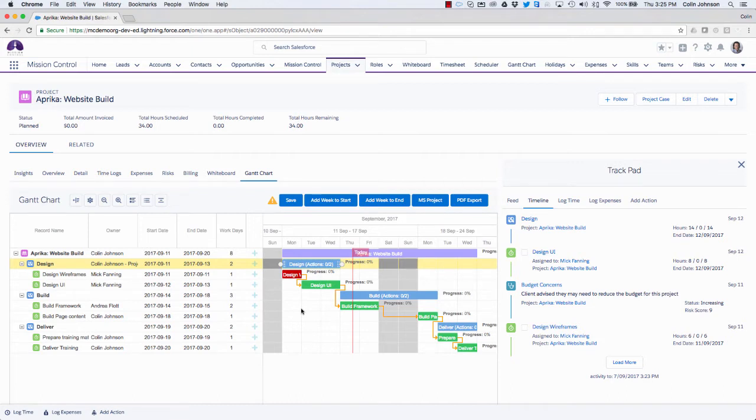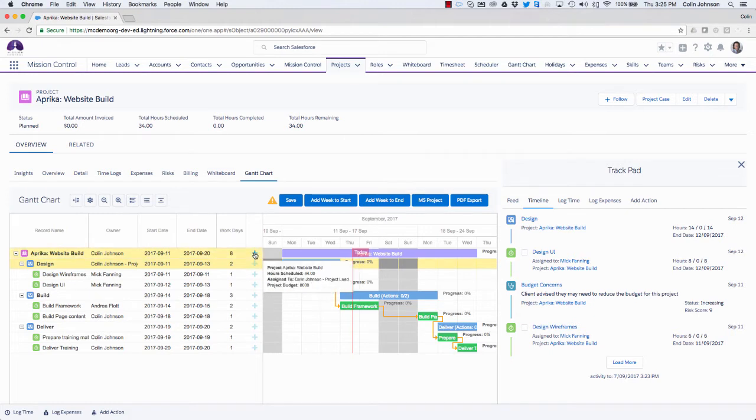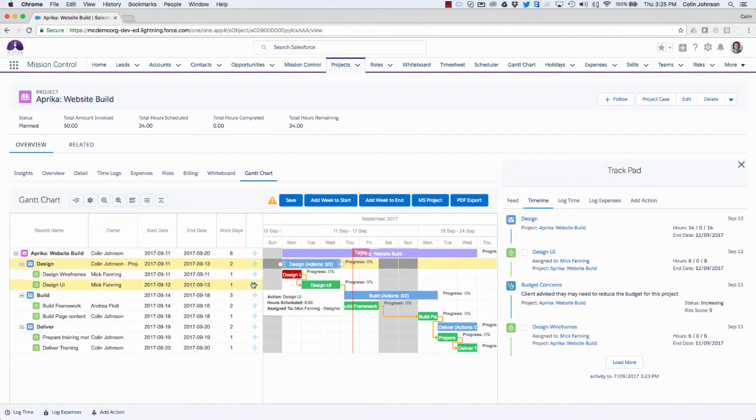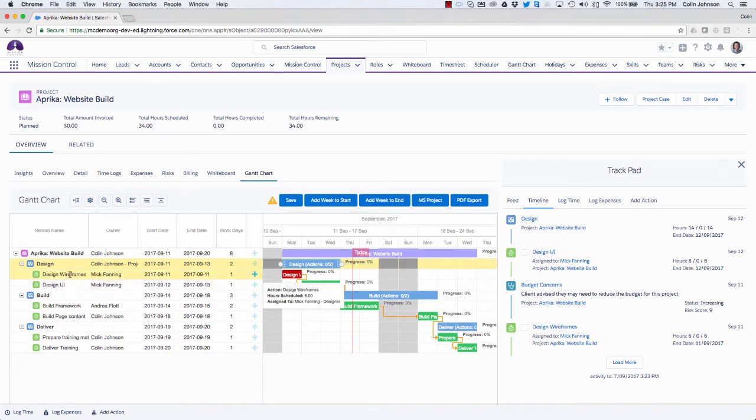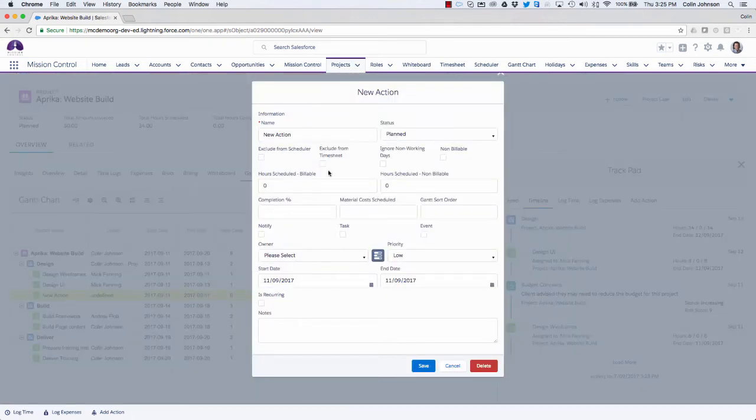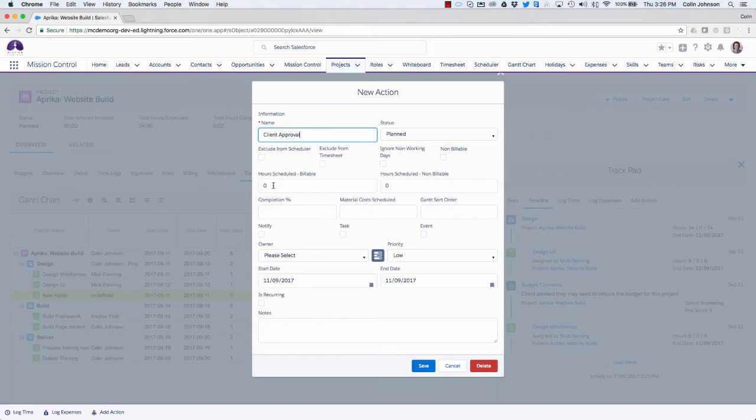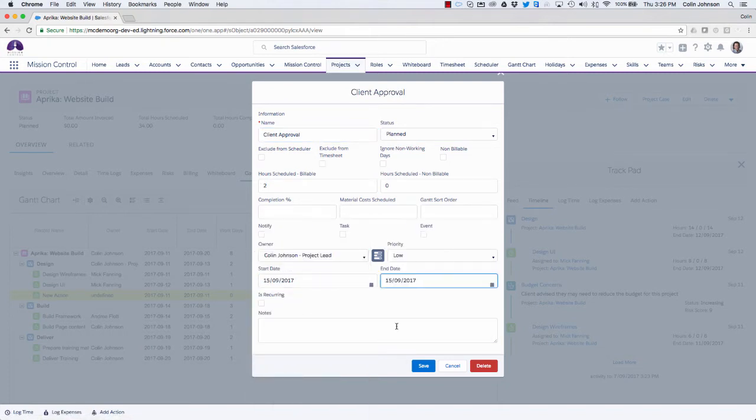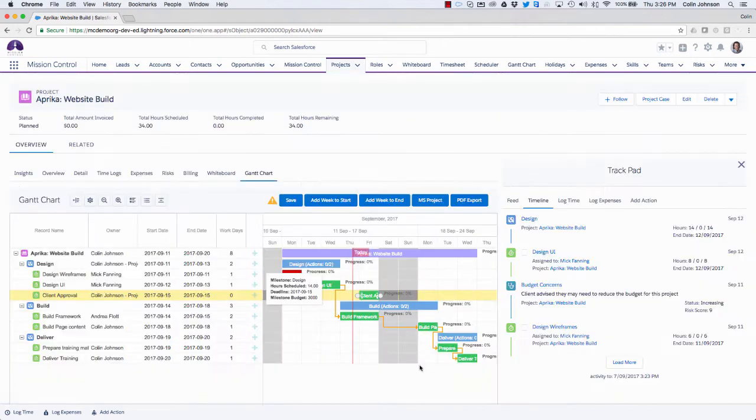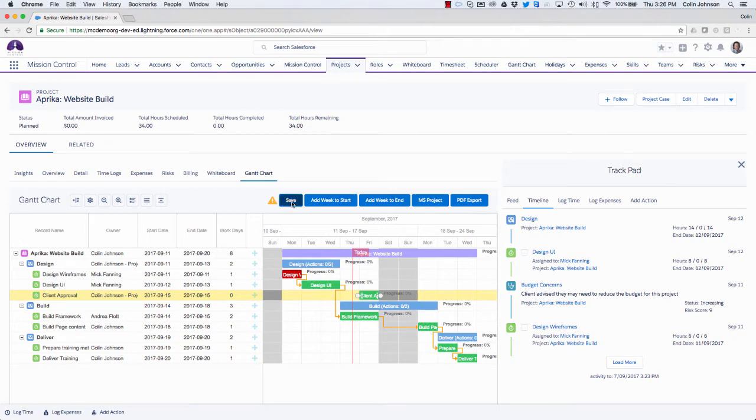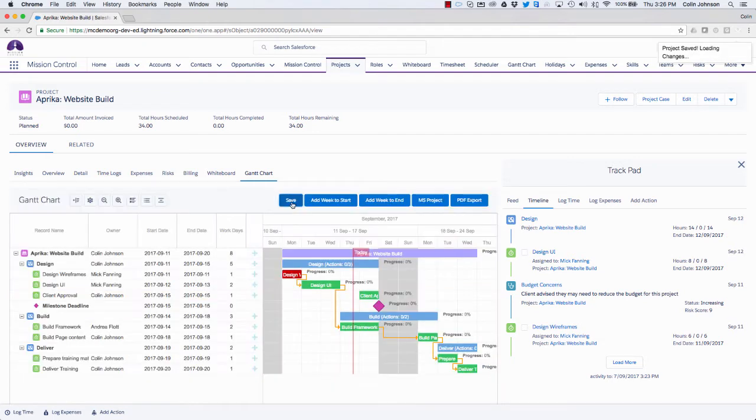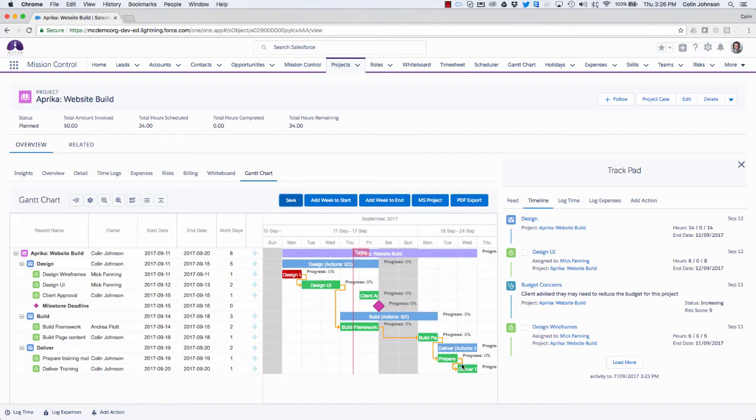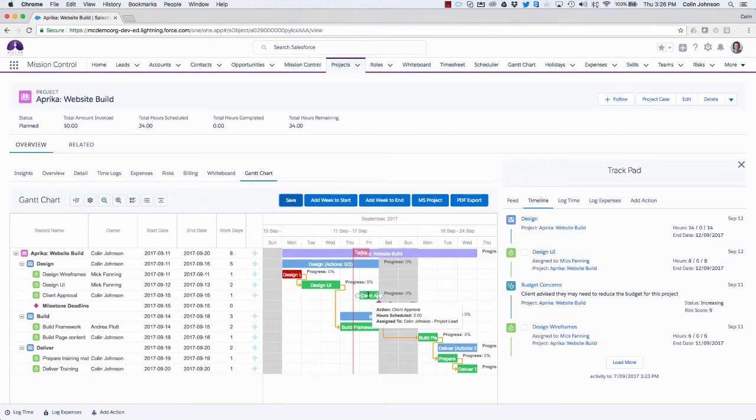Now what I can also do is add new records as well, just by clicking the plus sign. So for example, if I click the plus sign at the project level, that's going to allow me to add a new milestone. If I click the plus sign at the milestone level, it will allow me to add a new action within that milestone. So in this example, I'm going to be adding in a new action that will allow me to get some client approval for these designs. So simply click on the plus sign. Again, that opens up. I can put in the new details. You can see that's been added on there now. So if I save the Gantt chart, we'll just be able to see those changes that have been made. So what we've got now is obviously all of our dependencies that are in place. We've also got our milestone deadline, and I've also got my extra action that I've added on as well.